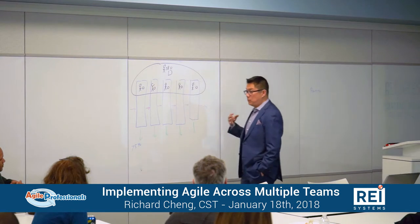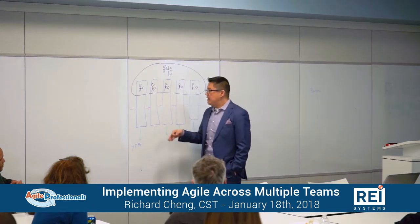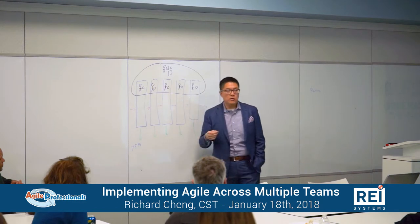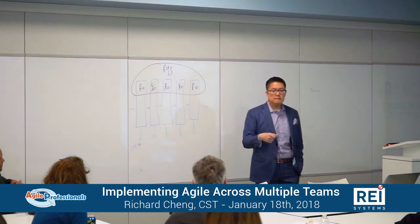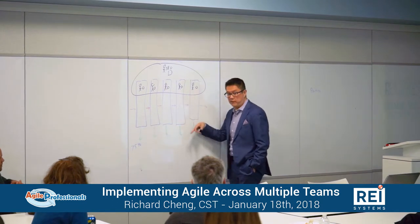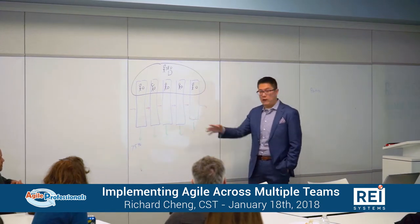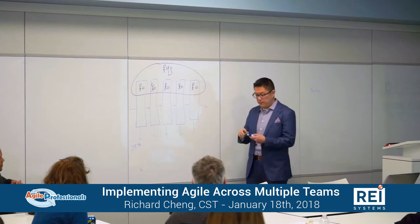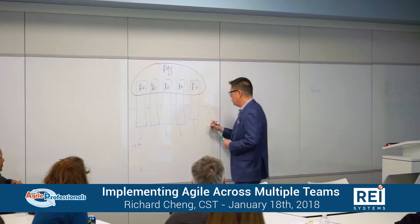Now, here's the problem as a pure mathematical equation. If I need all five teams to succeed together to deliver product, anyone know how to do the math? Multiplication. Yeah, it's multiplication, right? It's 0.75 times 0.75 times 0.75 times 0.75 times 0.75, 0.75 to the fifth power across five teams. If you actually do the math, I think it ends up being small.